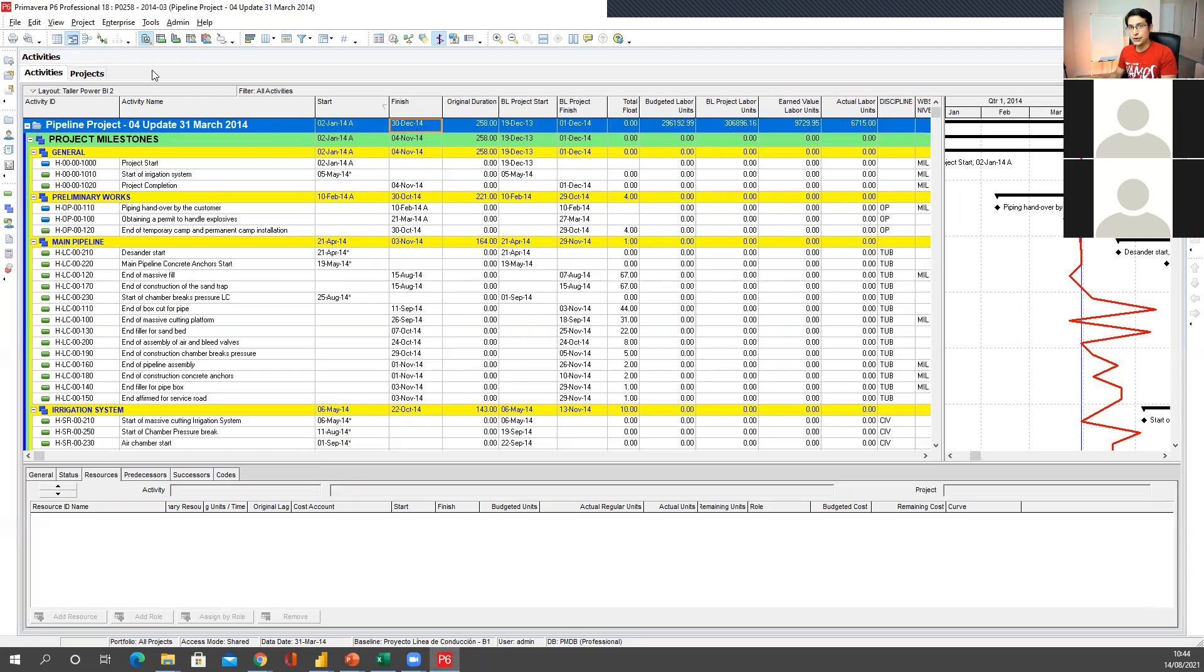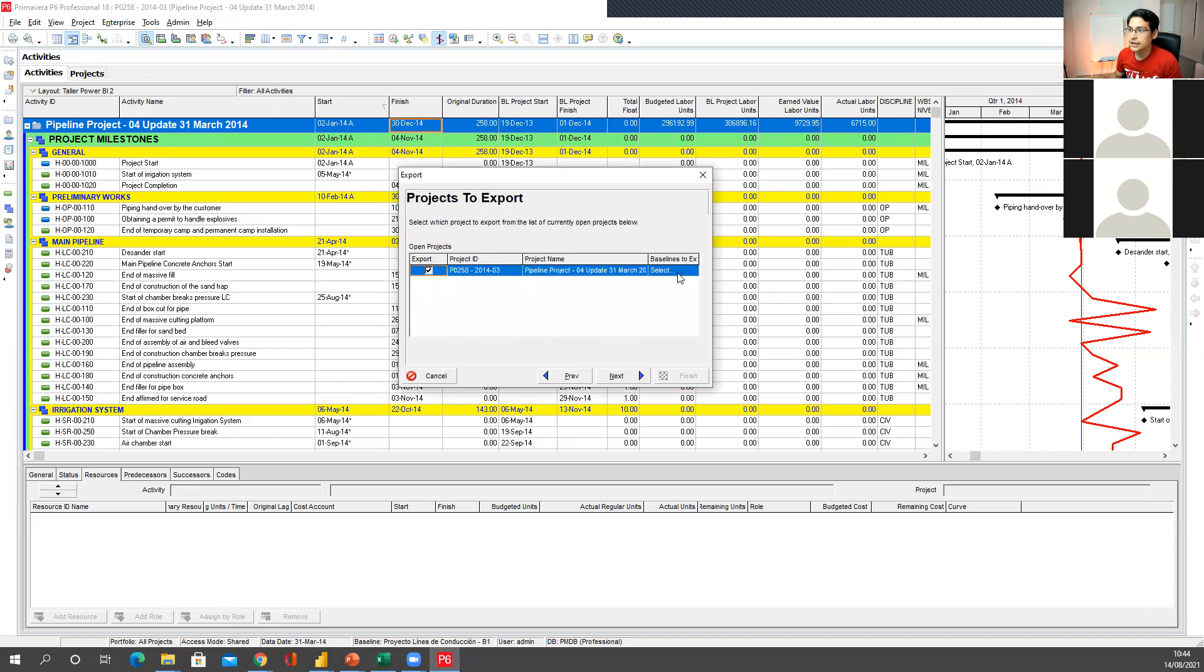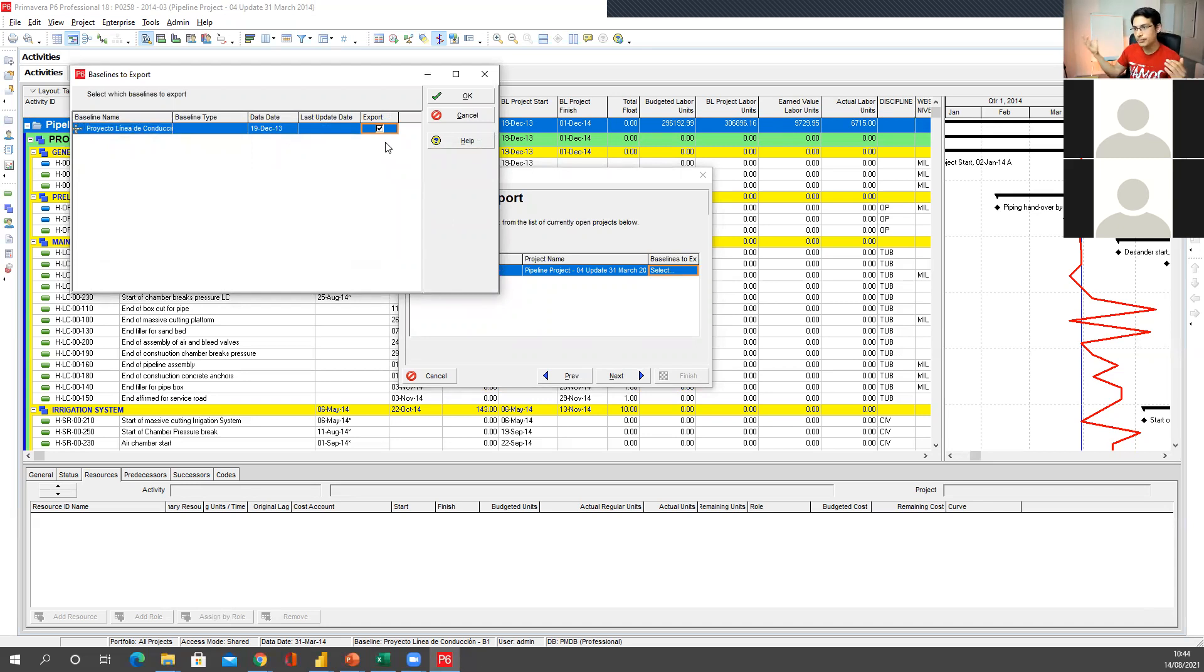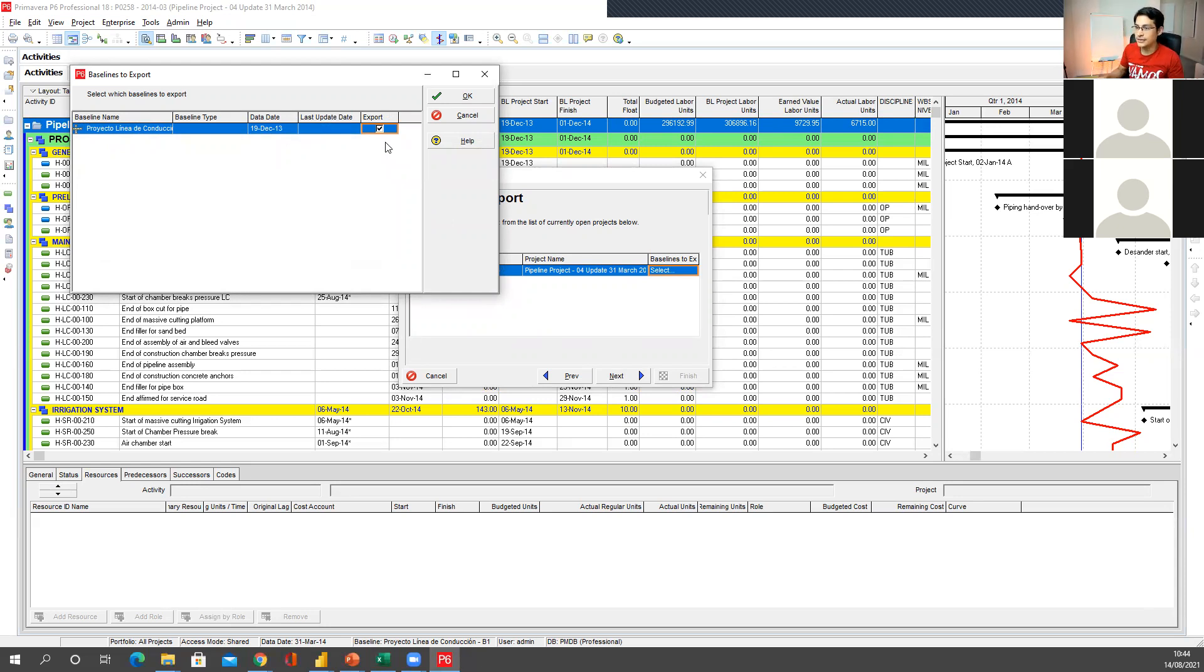So what I need to do is I just need to export this one, as we already told you. XML next, I want to go with the baseline. Needs to go with the baseline, otherwise it will break. Why it will break? Because that current Power BI file has already got the baseline in the previous export in December. So if now we don't export the baseline, it's going to be missing, data is going to be missed.